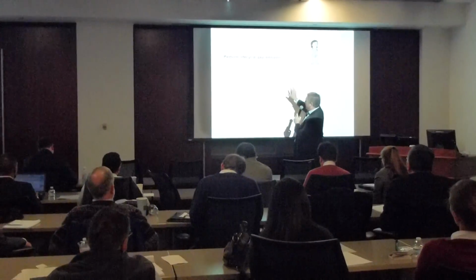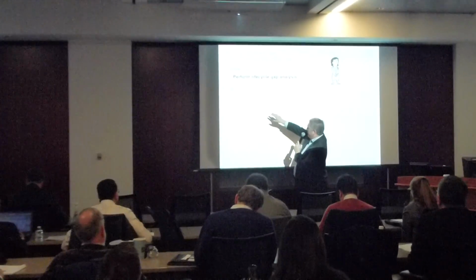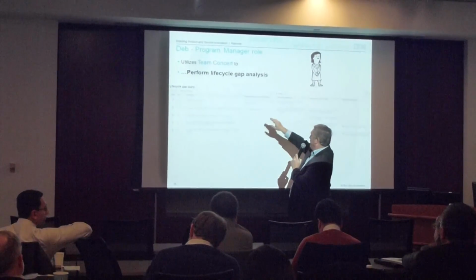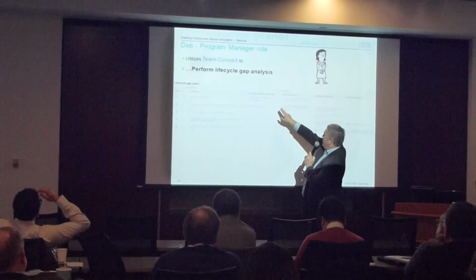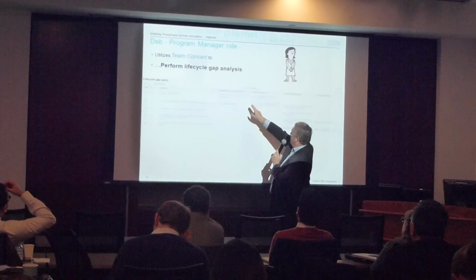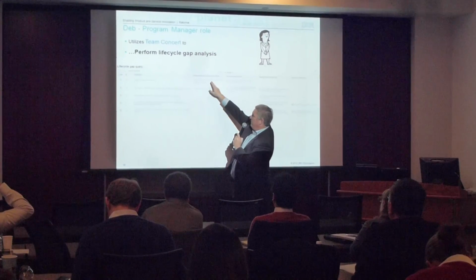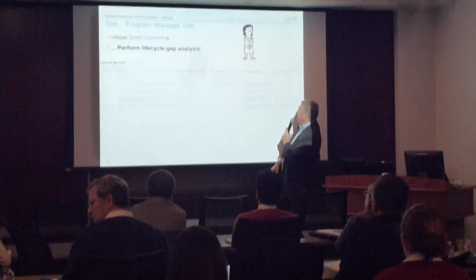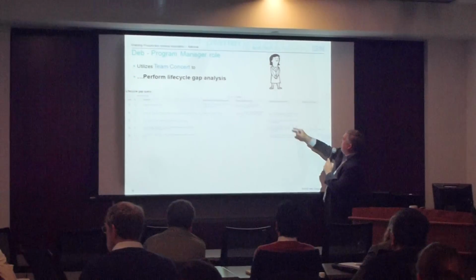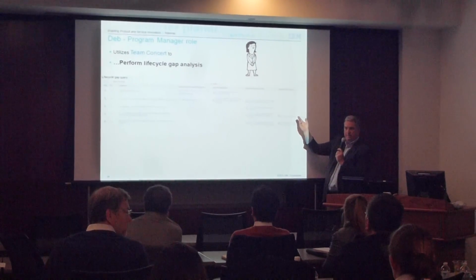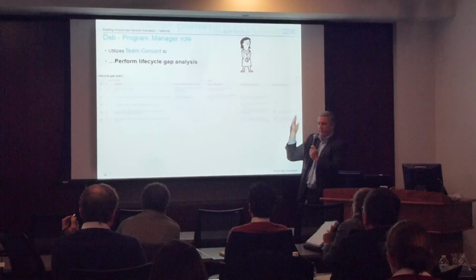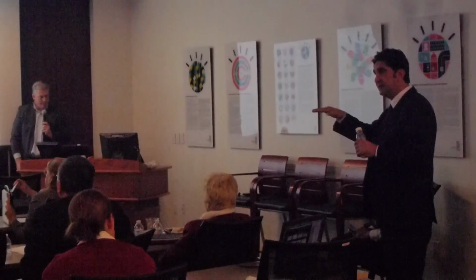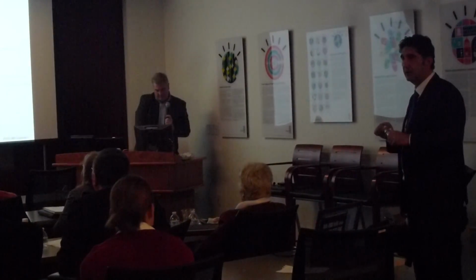Here's a good example of looking at it all at once. This is just a lifecycle query. I believe these are change requests or tasks here. This particular task is elaborated by this architectural element. This could be pointing to a System Architect diagram. It affects this particular requirement. It implements another requirement. It's tested by this test case. Since all these are part of the Jazz environment, you can run these types of reports. That's continuous traceability throughout the lifecycle.